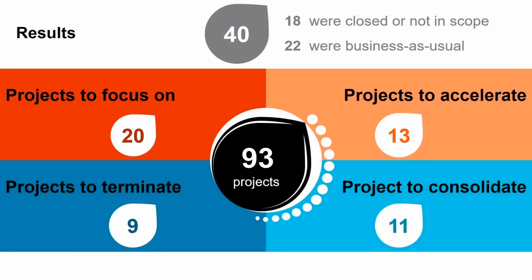What is the operational definition of what you mean by projects to accelerate? So projects to accelerate, we had the 4 simple rules. Projects to accelerate were projects that had executional deficits. By executional deficits, we mean that either the objective wasn't really crisp or clear, or the proof point behind it wasn't strong enough, or the milestoning plan was washy-washy, or a couple of elements, or the team that